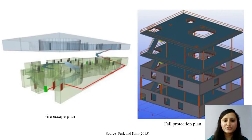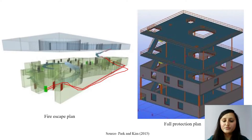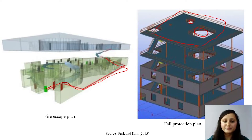Here are pictures to show safety plans in a BIM model. The first picture shows the simulation of a fire escape — the red markings show the fire escape plan. The second picture shows a model of a fall protection system, showing the protection plan of edges and floor penetrations. Using 4D modeling, this fall protection can be installed whenever required and removed when not required. Such modeling can help in planning for safety prior to construction, and similar scenarios can be modeled to plan for safety.